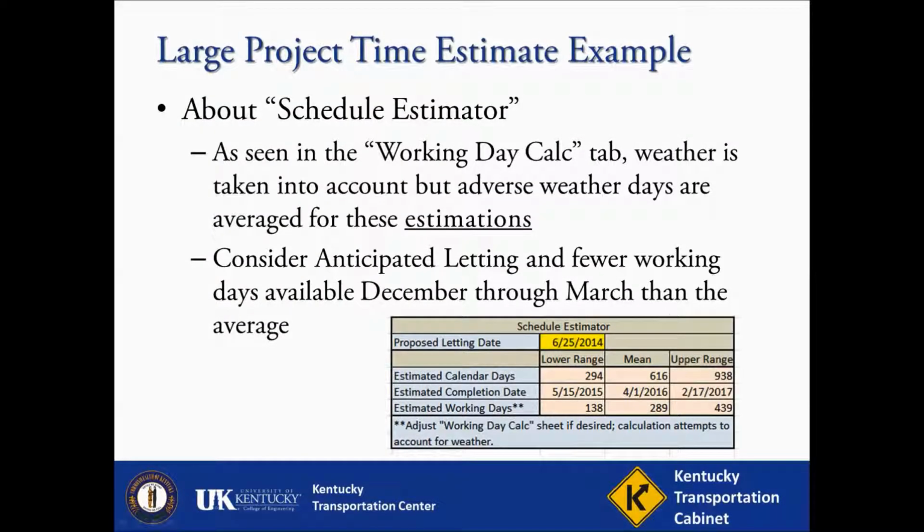One last aspect to reiterate is the schedule estimator. Again, as seen on the Working Days Calc tab, weather is taken into account, but adverse weather days are merely averaged for these estimations. Consider the anticipated letting date and fewer working days available in December through March when using these numbers.